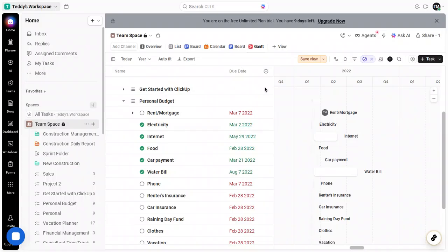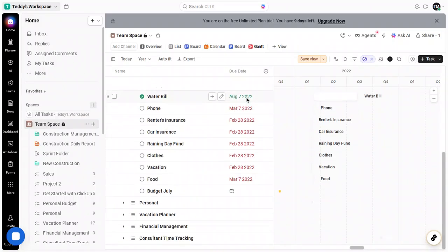Teams that track multiple initiatives can scan the view and understand which work belongs to which area without drilling into details. Before we wrap up, let's tie these techniques together so you know when to use each one. If you're reporting on progress to stakeholders, coloring by status is typically the most useful because it turns your timeline into a visual status report.